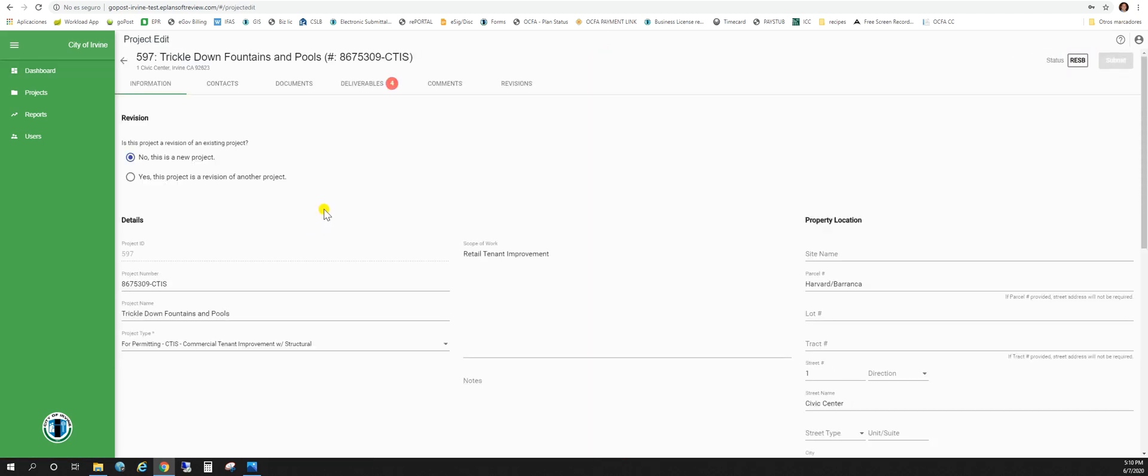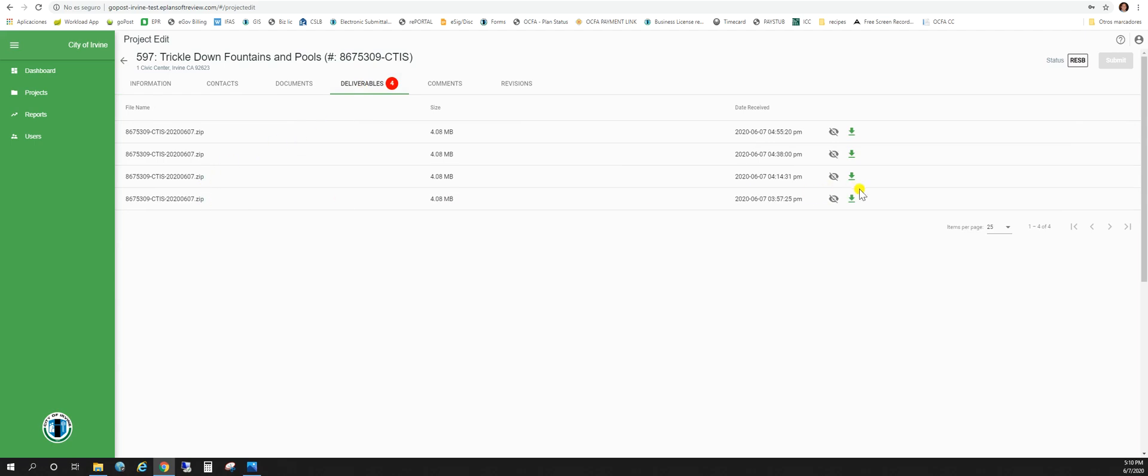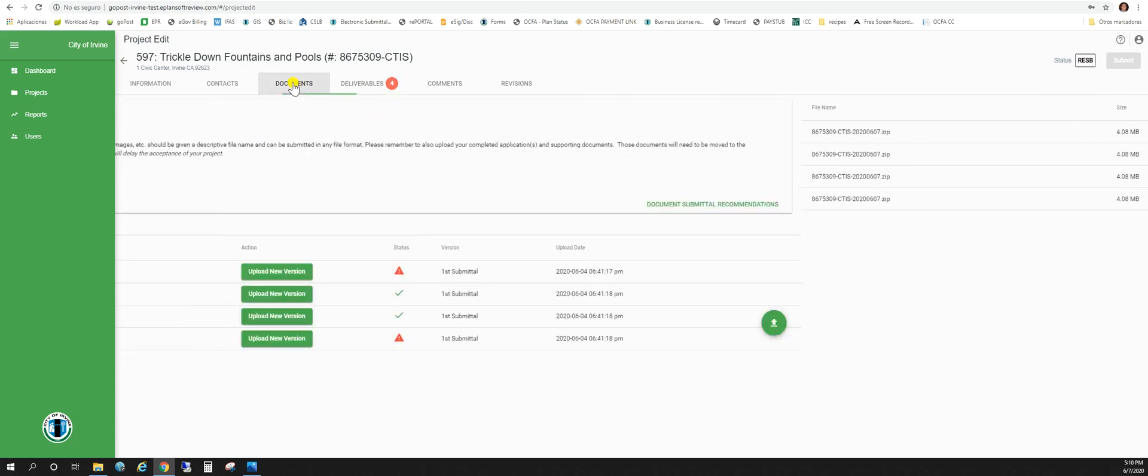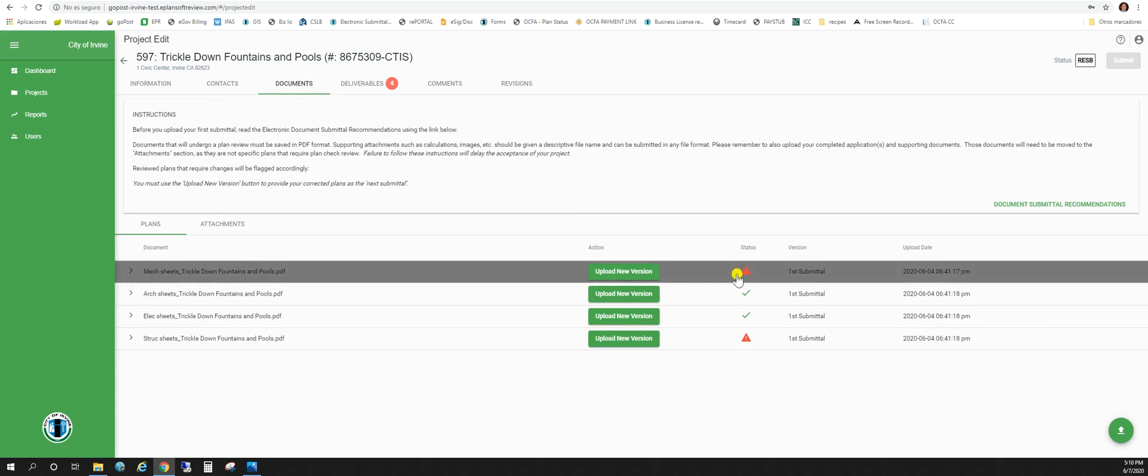Now if for some reason you have not received your email for plan check corrections but you know you do have corrections, you can always log into your project. Go to the deliverables tab and just click on the zip file and it'll have your plan check corrections list as well as the plan documents that need to be corrected. As you can see here on the documents tab under the plans we have this red triangle with an exclamation point. This means that this plan must have a new version uploaded.